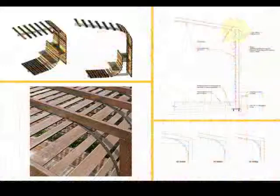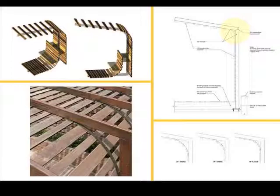If you refer to this slide in a clockwise manner from the upper left, the upper left shows the idea during design development of these curved planks. We were trying to do that with a custom curved piece of steel for the structure, and when we were working with our structural engineer, Andy Renfro, Blue Sky Design, it was deemed unfeasible for its purpose. Too much design for its purpose, too much cost. And so we went with the steel tubes meeting at an angle, and then a full penetration weld there to carry this somewhat long cantilever. We wanted to get the curve back and therefore did it simply by adding this bracket.